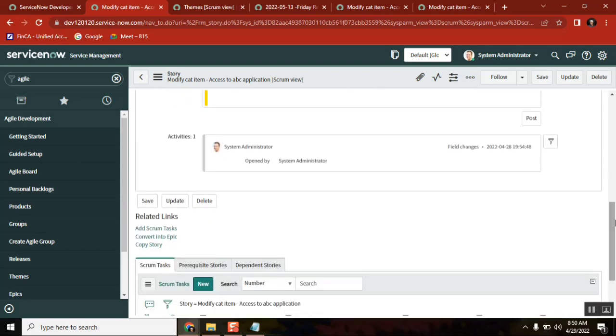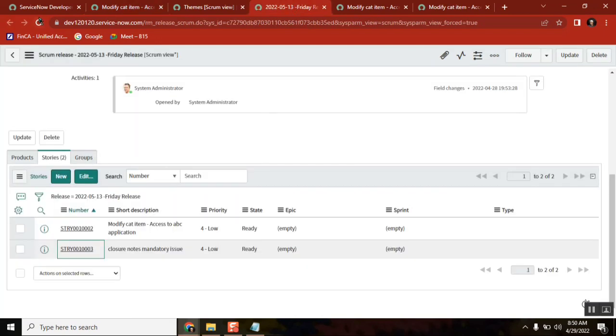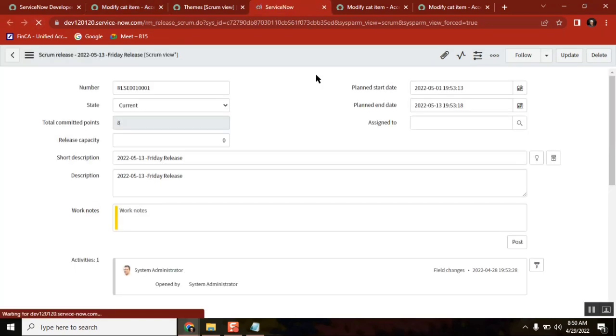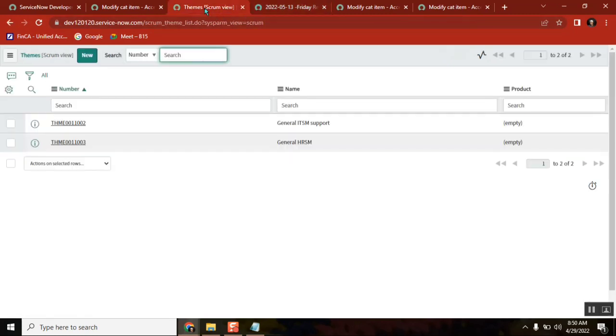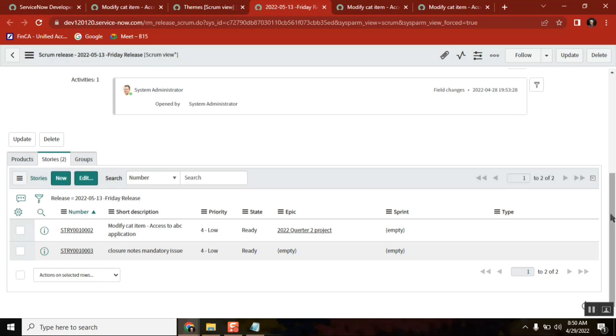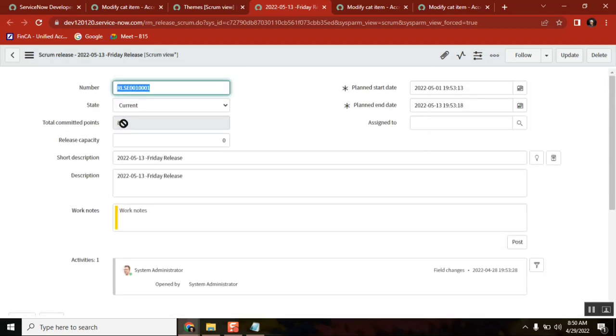When you are going through the story management, agile and all, you need to also manage a few things. There are some dashboards, like a burn down chart. There are a few things on how you measure the work. Points and all. See here, 3 plus 5, 8 added. How many stories? Our target for a release is a minimum of 30 points, or 40 points should be covered. The management will also see that. Then this is the calculation.